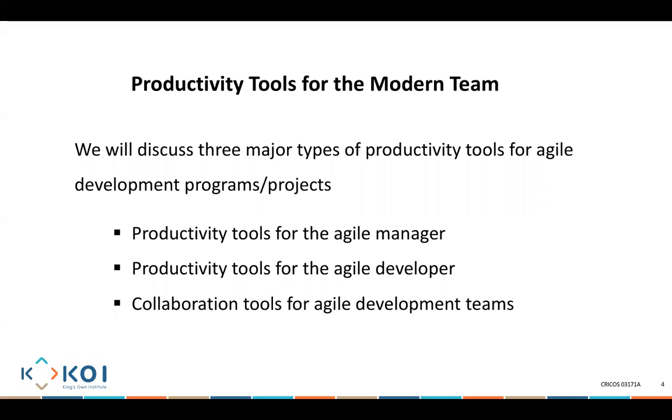Now, why do we actually get these three things? Well, because in an Agile project, you want to make sure you meet regularly with the team. You want to make sure that anything that is blocking you from achieving progress is resolved immediately and very promptly, because if you don't do that, your project is going to be very significantly delayed. So you don't want any of that outcome to occur.